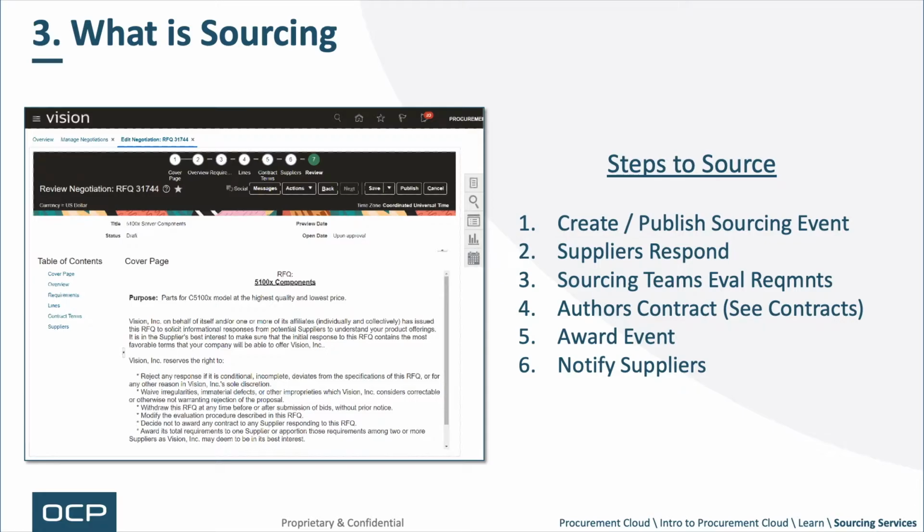So the steps to do that are to create or publish a sourcing event, often called a negotiation. The suppliers will respond to that, or do what's called bid. Sourcing teams will evaluate those responses. Lawyers or contract admins will author contracts. That event will, after contract, be awarded and suppliers will be notified.